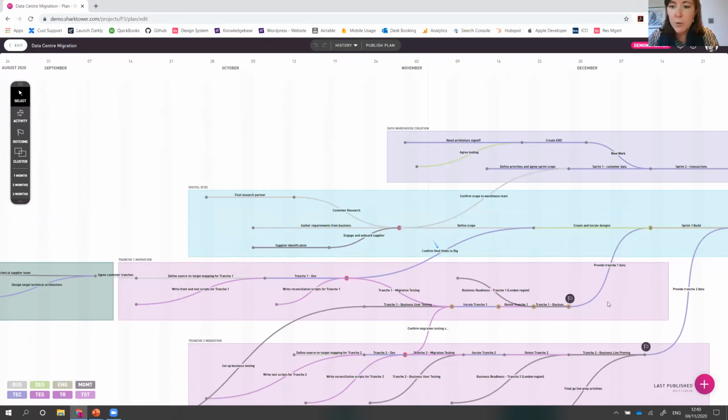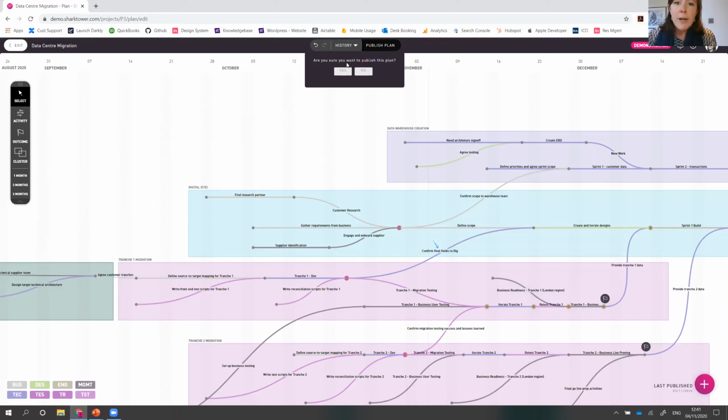There's not much wiggle room in shortening those, but we do have some contingency in this one here. So we'd have that open conversation, make sure the people who own those specific activities are in the room, aware of it, and then we could just shift over all these activities to buy ourselves a little bit more time, and we can do that in the meeting because we've made that decision and agreed that. So that's essentially how I would run the meeting.